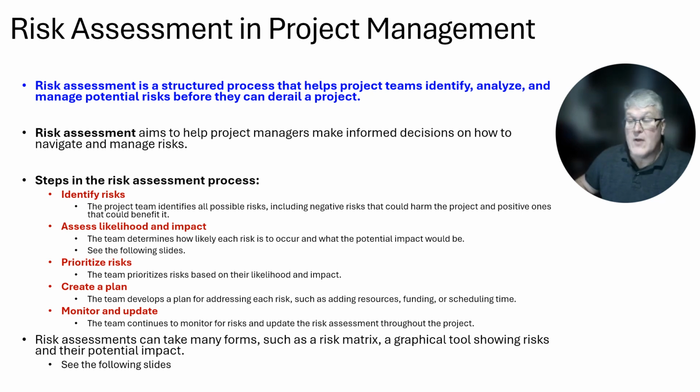You create a plan for how to deal with the risks that you've identified, and then you monitor and update throughout the course of a project regarding these risks. And again, all of this would be something that you would discuss when you're developing the business case, and that would then head towards the project charter.